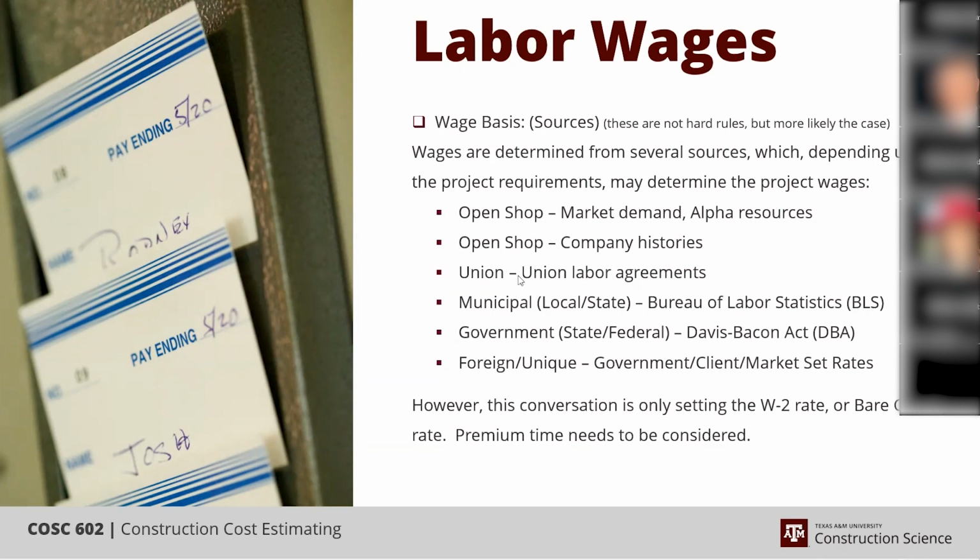Now, if you're working municipal, and I think this touches base with several of y'all, that tends to be Bureau of Labor Statistics based or Davis-Bacon Act based. Government, state, federal, large state and federal really leans on DBA quite a bit. The municipal, the local, and smaller state projects, regional, I've seen them base their wages on DBA, but I've also seen them lean on the BLS as well.